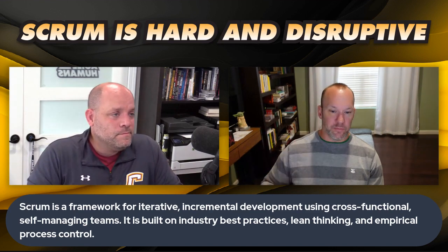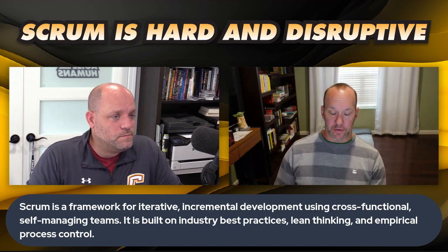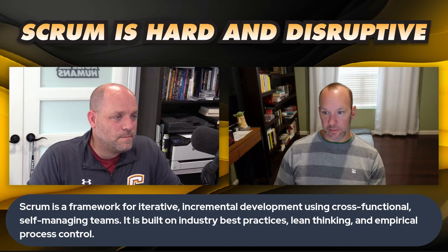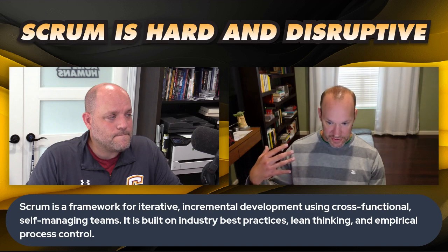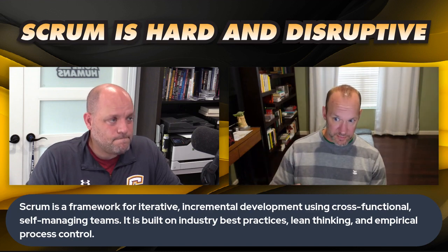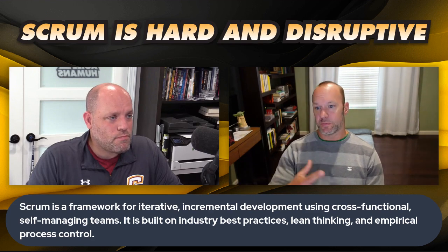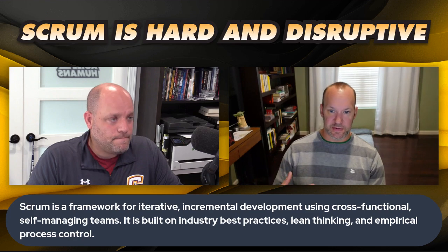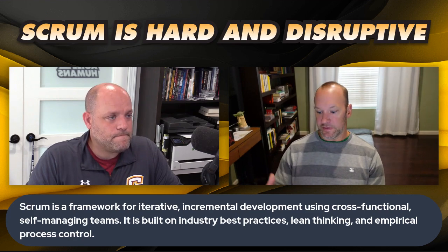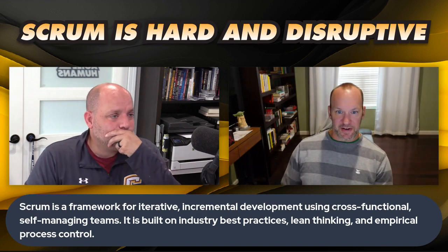Yeah. And this is from a empiricism, from a product and process perspective, right? From a product perspective, we have a product owner that is always thinking about what's the most valuable thing to do, and then bringing stakeholders in to have a sprint review. Right, so that's baked in from product for Scrum. And then we have process where the Scrum team meets in sprint retrospective and empirically, inspection, adaptation, and transparency, decide how to improve the process, right? So a lot of heavy stuff in here.